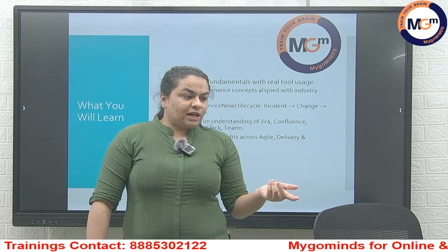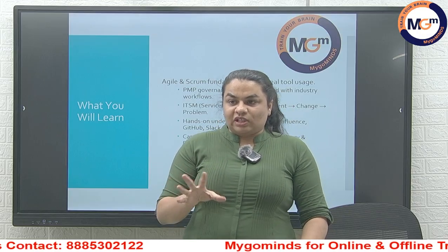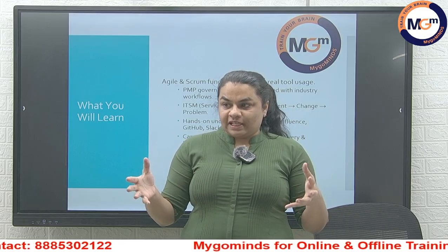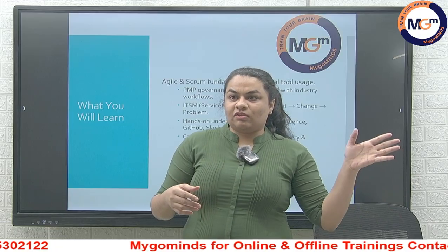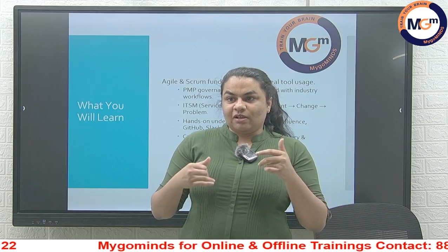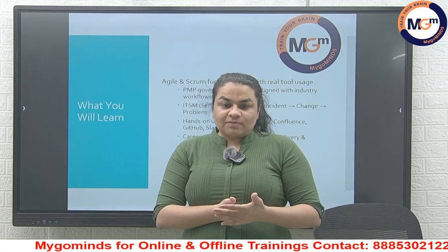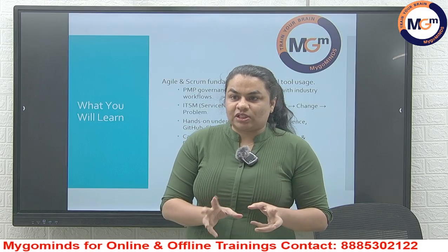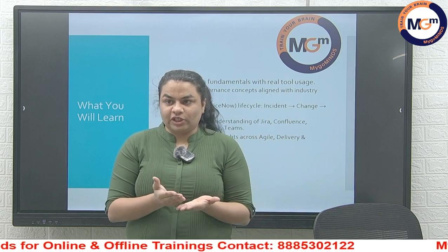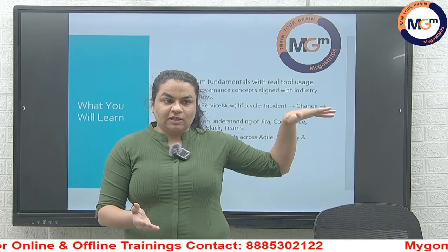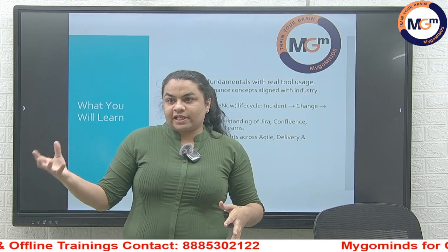So that's where the Scrum Master, project manager, product owner, and business analyst come in. These are the four people who are going to ensure this runs smoothly. The Scrum Master will facilitate the stand-up meetings, which will be 15 to 30 minutes every day. We do the stand-up calls because we need to get the update: what we did, where we are working right now, and what our next step will be.